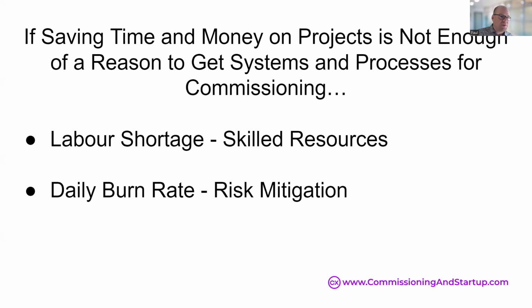$100,000 per day. Projects can easily cost $100,000 per day in labor and materials and interest and escalation and everything that adds up. It's not uncommon for each day on a project towards the end during commissioning to be worth $1 million per day. And I've worked on projects that have actually had a $5 million daily burn rate. So there's a lot of money at stake during commissioning, and each day is extremely valuable. And each day of delay is very expensive, which means your commissioning must go well.